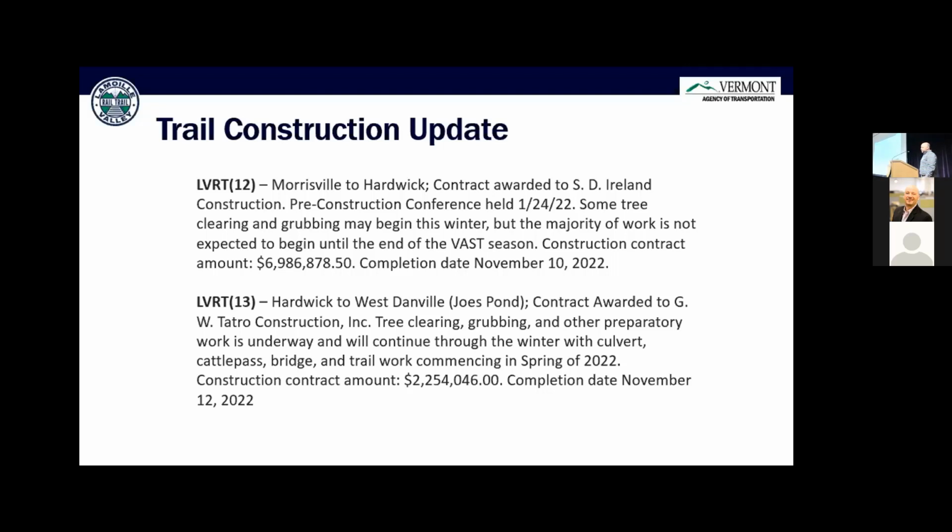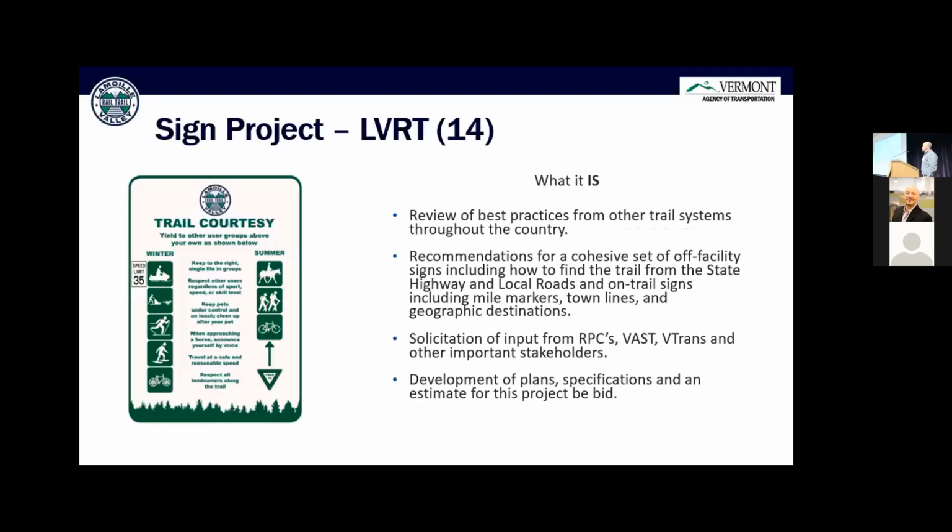And last, LVRT 13, awarded to GW Tetro, November 12th, 2022 completion date, $2.2 million. So that gets us a trail open by the end of 2022. That's all the work that goes into bridges, culverts, cattle passes, and the surface of the trail, all the upgrades we need to do. Following closely behind that, we have what we call LVRT 14.